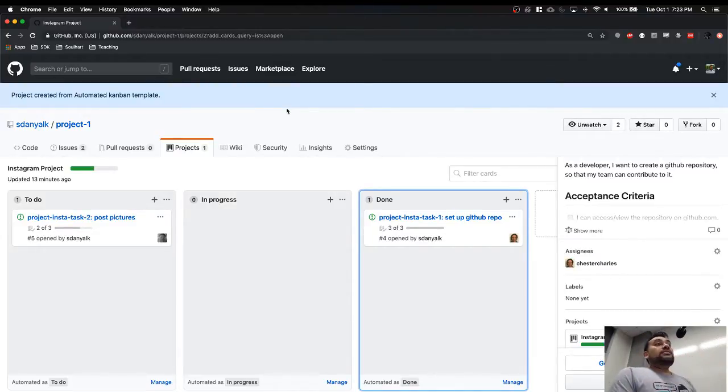I would recommend, as a team lead, try to see if you can convince your team to have these every day. And it doesn't have to be in person. You can do it on Slack, right? Maybe you have a Slack channel for your project. Every morning at 9 o'clock or in the afternoon or in the evening, it doesn't matter. Set a time and everybody posts the answer to these 3 questions. Yesterday I worked on this. Today I'm going to work on this. Do I have any roadblocks? Yes or no, and then mention a roadblock. That's it.